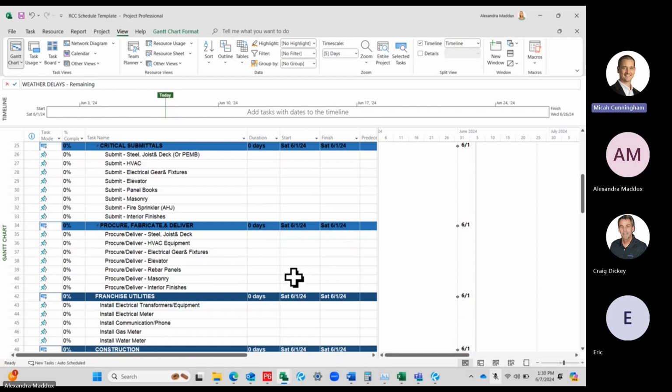Oh, sure. So when you first get your project, you're going to set up your baseline schedule, which sometimes you might have as a preliminary baseline and then a detailed baseline, depending on what phase of design you're in. So the detailed baseline would be when you have 100% drawings and you're building out the schedule with the detail where no activity is more than 15 days, usually the base point of what you want to have detail for. And this would be the one that you have in your subcontract if that's not set up yet. So every activity would have just one trade on it so that you can track that separately.